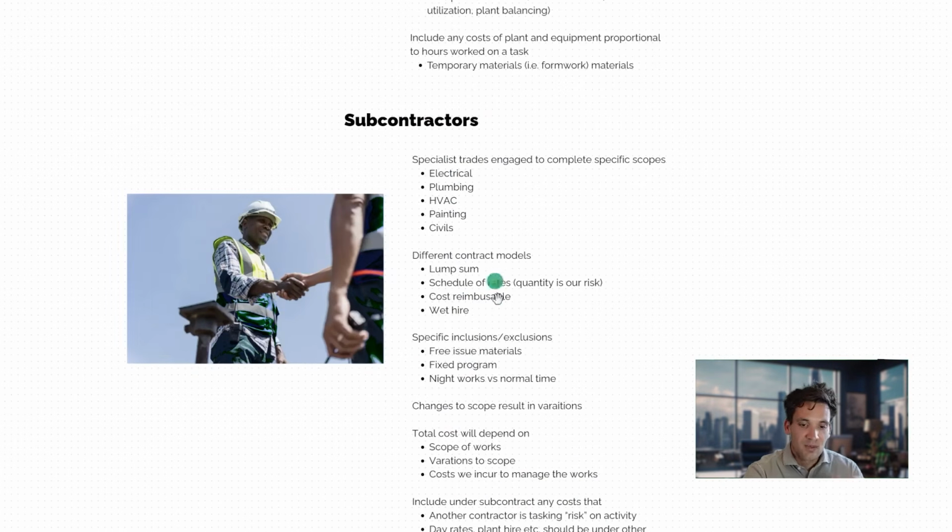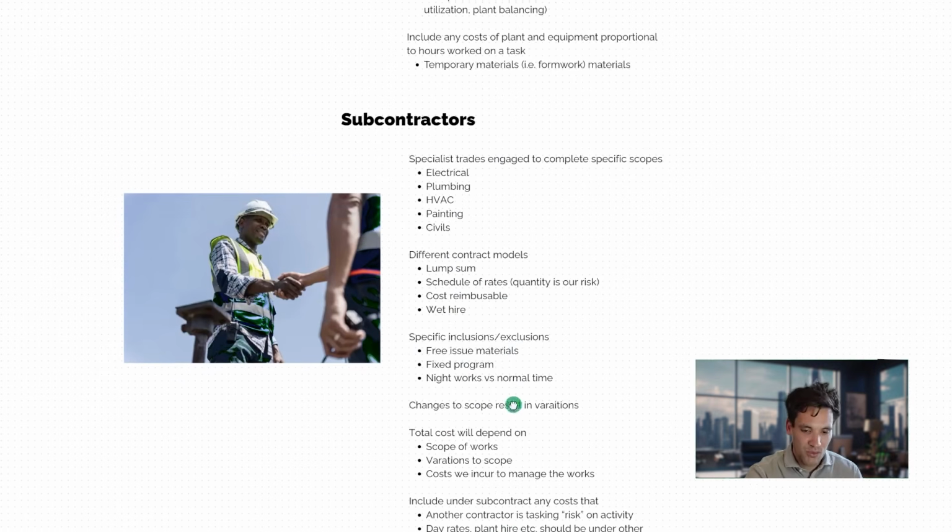Now, again, when we're talking about cost reimbursable contracts or wet hire, I don't consider them subcontract costs. My rule of thumb for what is a subcontract cost is something where another company is taking risk on that item, meaning they're taking the responsibility to do the work and they're quoting to do it either through a lump sum contract or a schedule of rates contract.